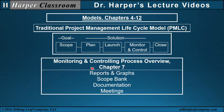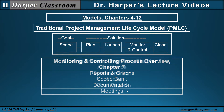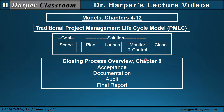In the monitoring and controlling process overview, Chapter 7, here's where the reports and graphs of the plans and baselines are produced, along with the scope bank, documentation from communications, and meetings. And finally, closing the process, Chapter 8, where we have acceptance, the documentation, audit of the project success, audit of the project process, and then the final report.